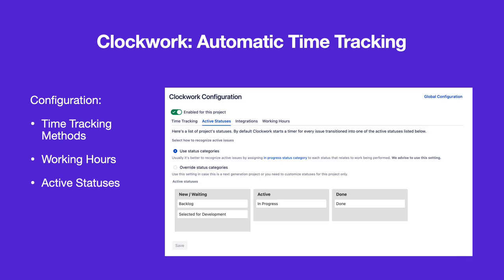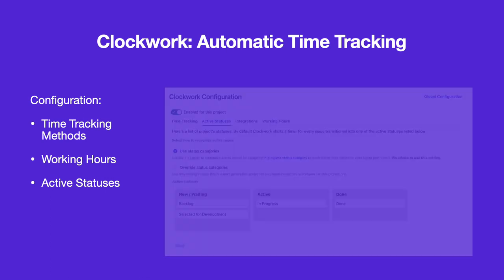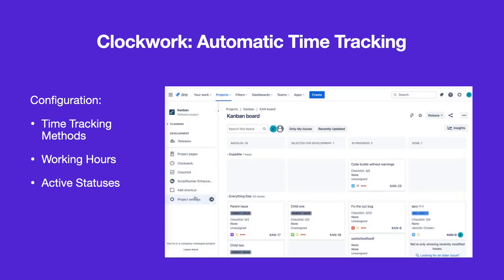Clockwork will start recording time when an assigned issue is transitioned into an active status. By default, any status that is part of the In Progress category will be considered active, but you can customize your active statuses at a global or project level.